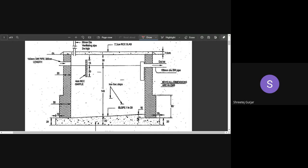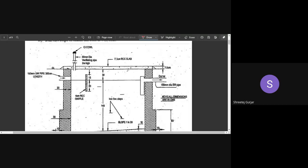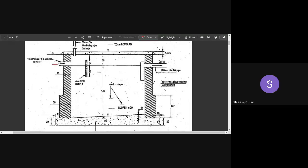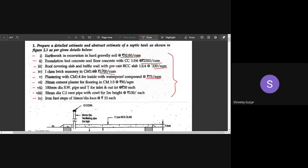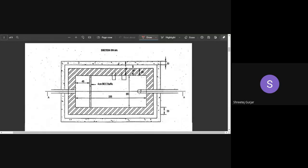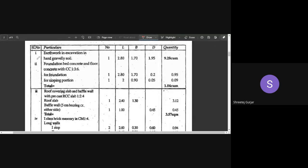This is the septic tank — effluent from the house enters here, then flows to the soak pit. Starting the estimate, the first thing to calculate is always earthwork in excavation.